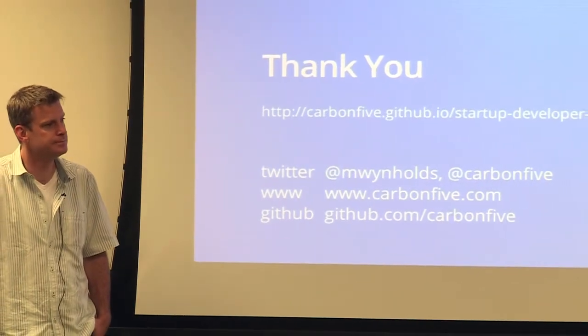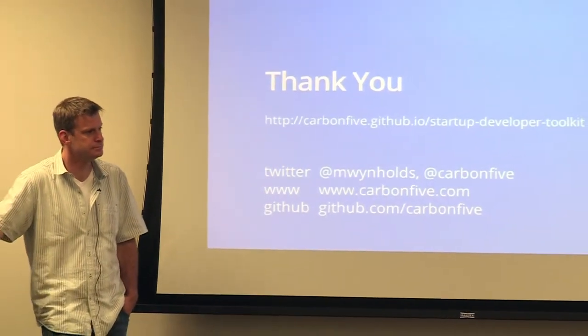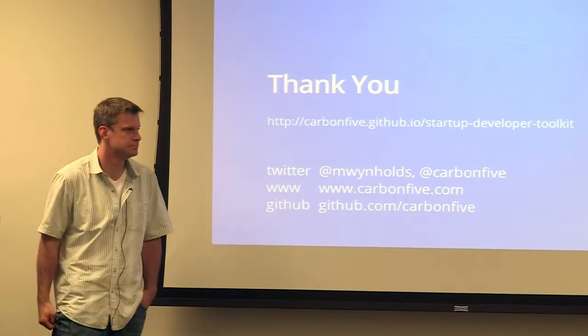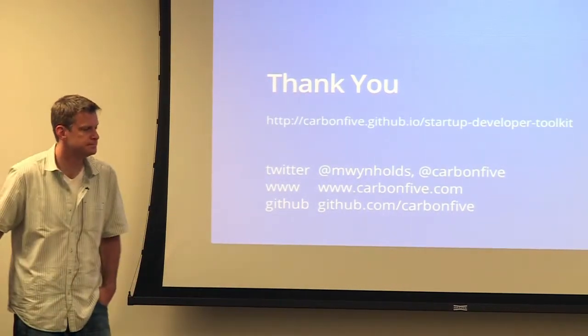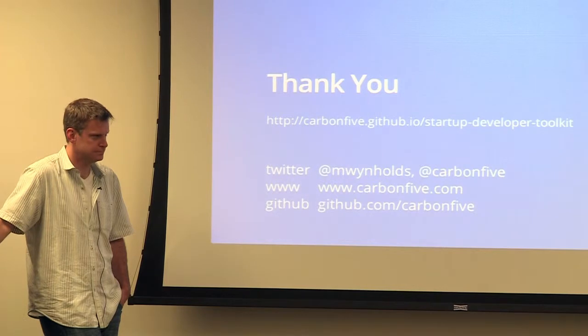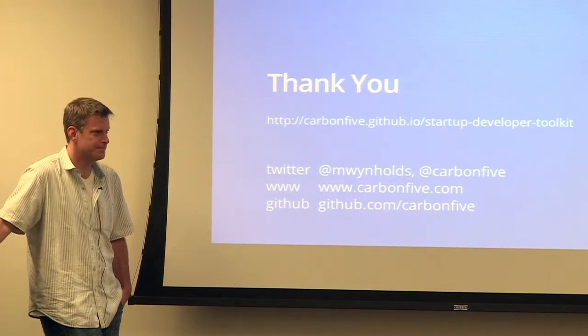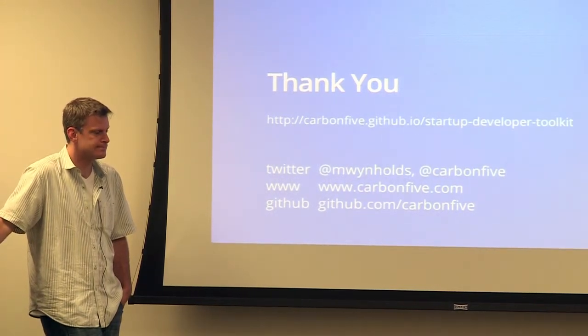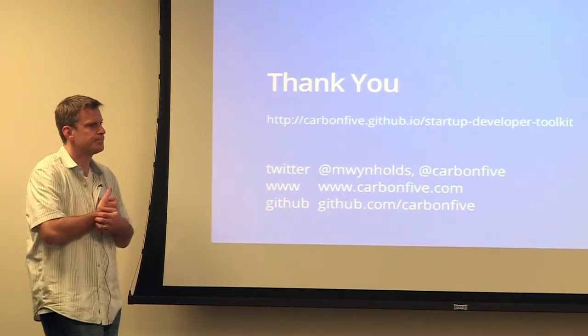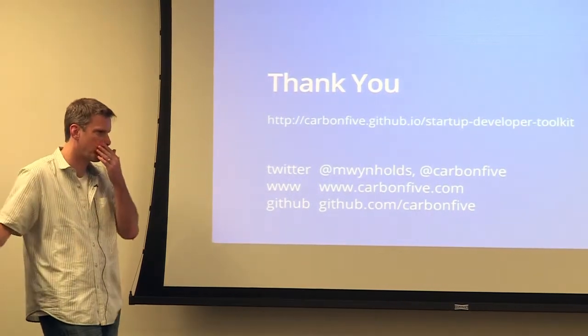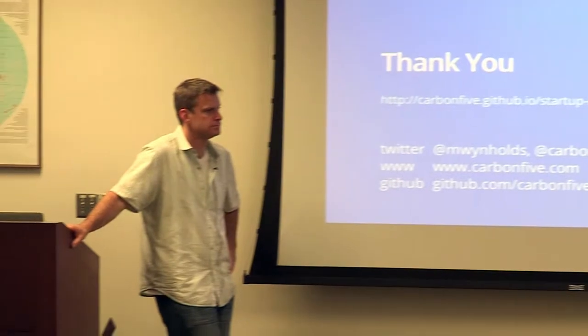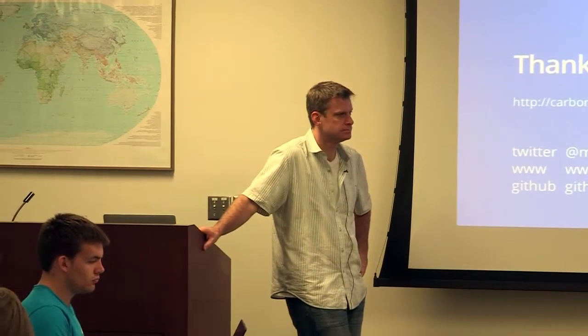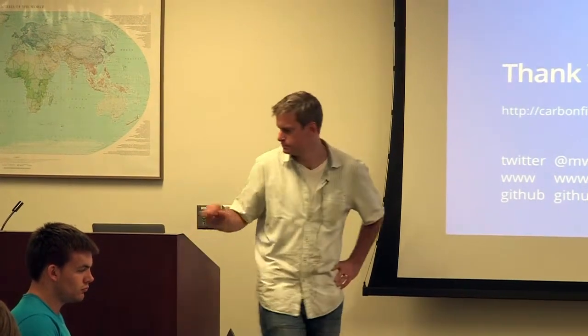So we kind of did what Smart as K-12 did with just building our own project management tool, and we run it on a Google Doc that's nicely color-coded. Yep. And so we've tried doing it where if something in development takes 2 to 3 days, we try to break it up into 2 to 3 day chunks. Mm-hmm. But sometimes you come across something that needs more time than that. Yeah.